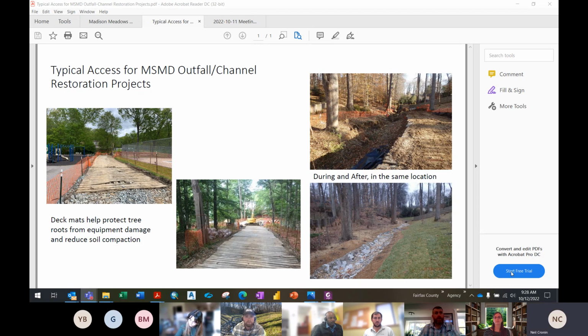I see. And as far as duration? At this point in time, probably 6 to 7 months. Once the large part of my scope is done, planting will occur for this project most likely in the fall, because we'll be finishing late spring, early summer. So we'll come back out during the planting window and reforest, as John mentioned earlier, in the appropriate planting windows. Okay, great, thank you.